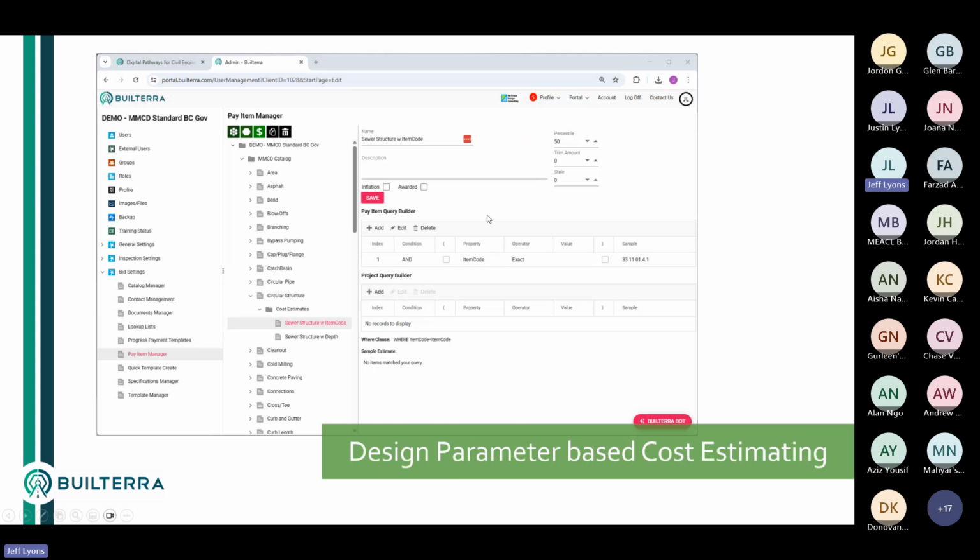So there's some pretty elaborate estimating that can be done for the item, as well as you can add project related attributes. So maybe project type, or maybe there's pricing differences that are unrelated to the item itself. So it has a fairly good way to query. And there's obviously some stuff up here for stale dates on data. You don't want to use data that's more than maybe 2 years old.